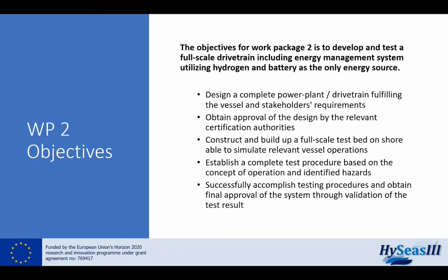Obtain an approval of the design by the relevant certification authorities. Construct and build up the full-scale testbed, enabling the system to simulate relevant vessel operations. Establish a complete test procedure based on the concept of operation and identify hazards. Then finally, successfully accomplish test procedures and obtain the final approval for the system through the validation and test results.